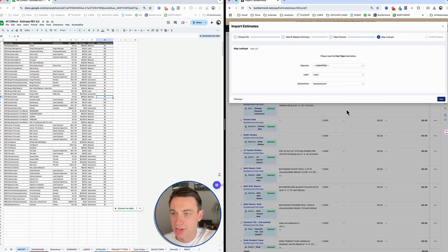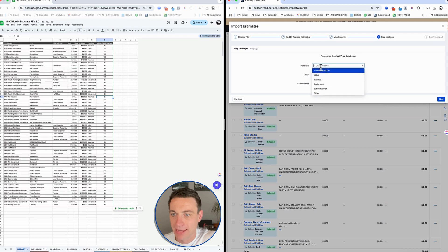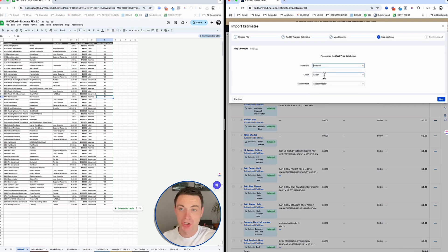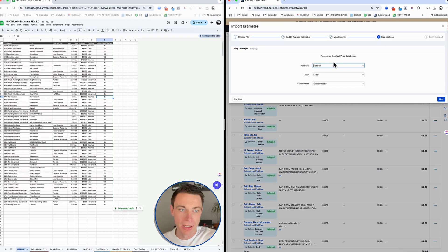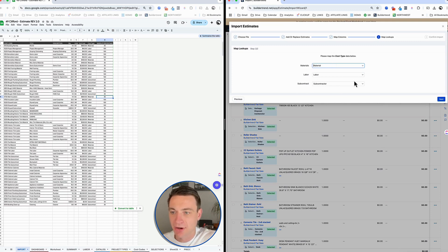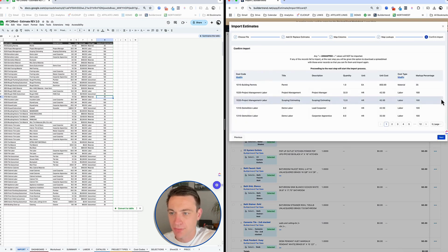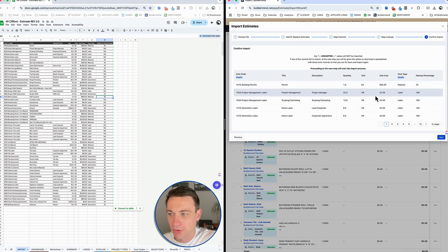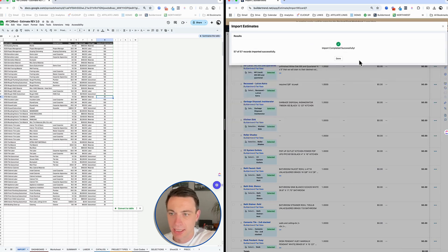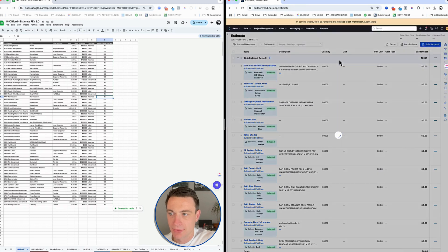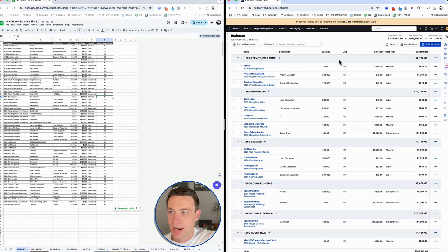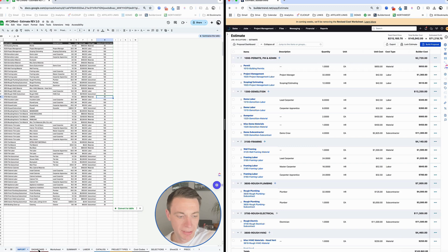Now I can click next. The next thing it'll do is looking at cost type. I've got the word materials, plural. It wants it to be material. Great. Now best practice, what I should do is update my template to be material, right? That's clear, but at least it's making it so I don't have to go back and re-import. So we should be good. It gives us a preview of what's about to happen. Let's click next. Let's see this thing get loaded into BT. The import is complete.